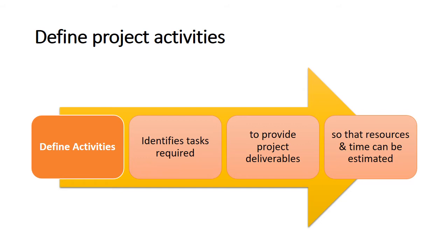If you are asked to manage a project in a new domain, you might also use experts in that particular field to help define tasks so you can understand what activities are going to be involved. You may wish to create an activity list and have an expert review it and suggest changes. Alternatively, you could involve the expert from the very beginning and ask to have an activity definition conversation with him or her before even developing your first draft of the list.